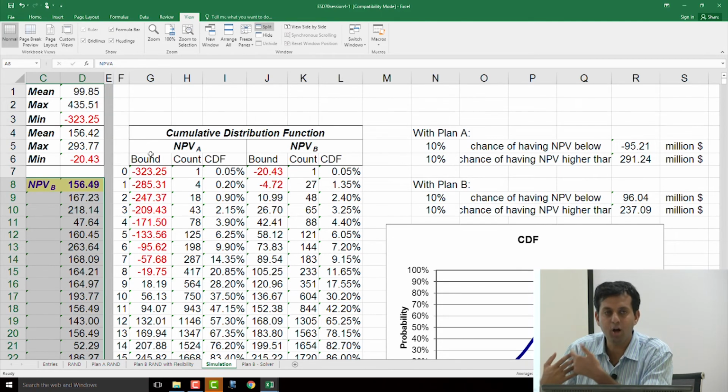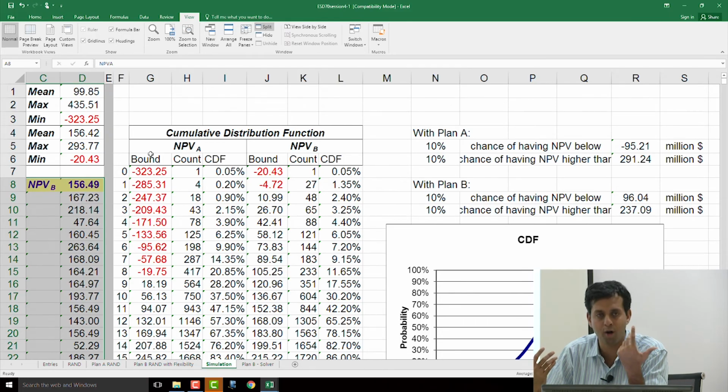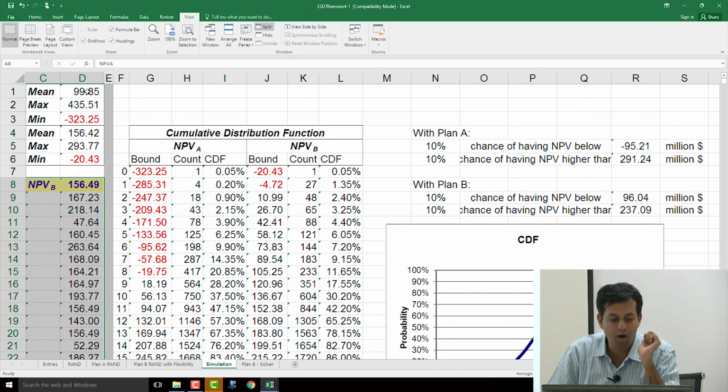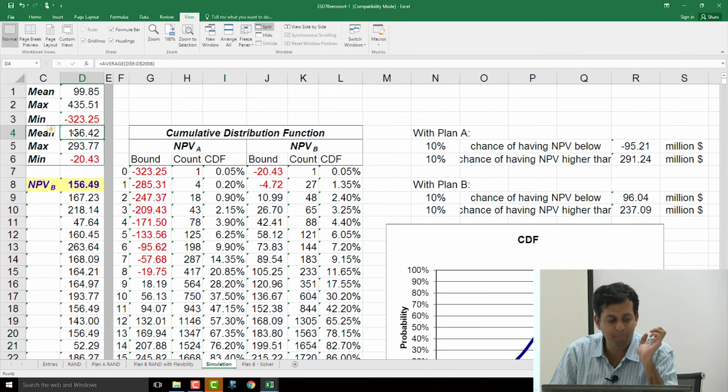And it's very clear, because of this sort of law of averages reasoning, that if you assume inflexibility, and this is what most consultants do, by the way, you get a certain response. If you start assuming randomness, you start doing Monte Carlo simulations, and you start putting in flexibility to combat that randomness, then you find you get much higher NPVs. Recall, the NPV of A has not changed, it's been hovering around 100. The NPV of B has gone from 60 to 165, 2.5 times, whatever.